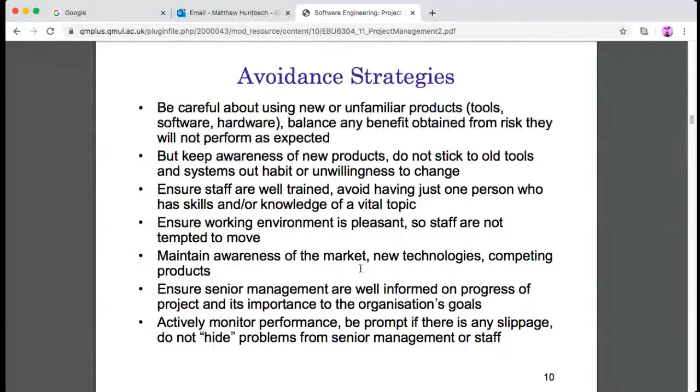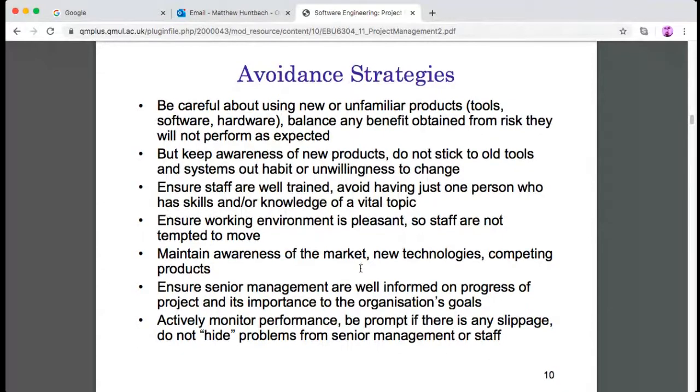Okay, risks are divided into project risks, product risks, and business risks, although some things are covered by all of those. Project risks are when something goes wrong with developing the project, the classic example being when one of the workers becomes ill and can't carry on doing the work. How can you plan for that? Product risk: what can be wrong with the actual programming itself? Something can be wrong with the programming itself that could cause problems.